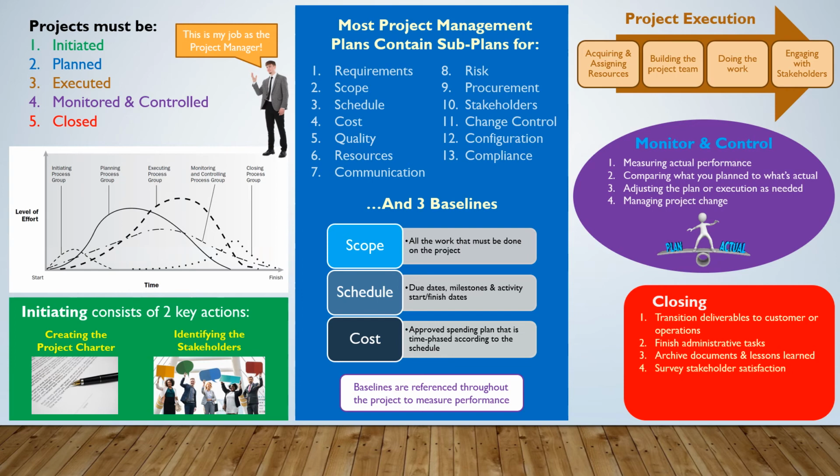We want to survey stakeholder satisfaction to know how people feel about the project outcomes. We may have met our scope, schedule, cost baselines and also met a business need, but sometimes we want to make sure that stakeholders feel good about this project. That's important to learn moving forward to new projects. We need to release our resources. We don't need the equipment, the materials, and all the team members anymore because the project is over. So we need to release them and help them get to where they belong to work on their next project.